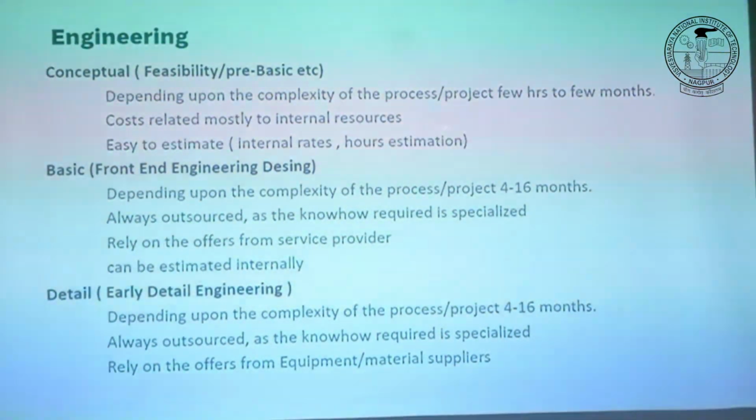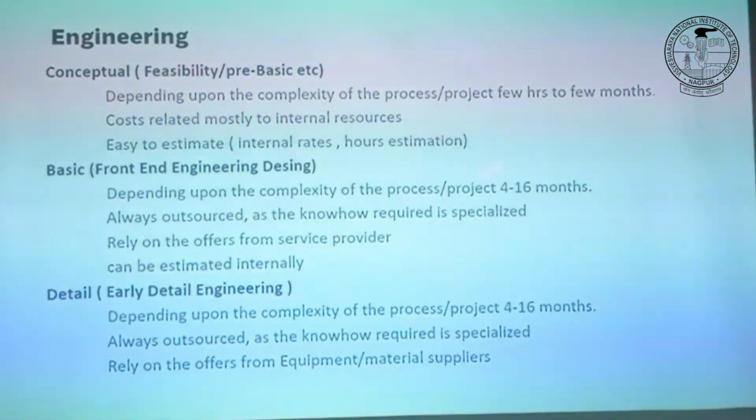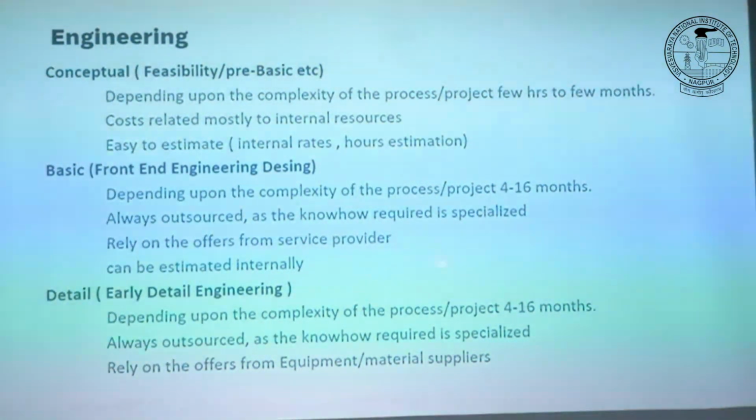In terms of time, a conceptual one can take a few hours to a few months. The basic one can cost you 4 to 16 months, with some 5 to 10 people working on it. But a detailed one can cost you 16 to 20 months. And as I said, maybe 70 people working at one point, at peak time.